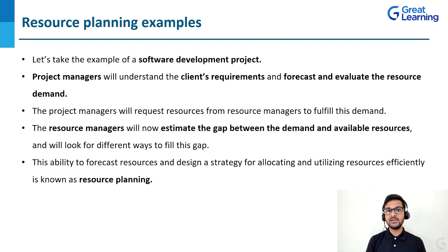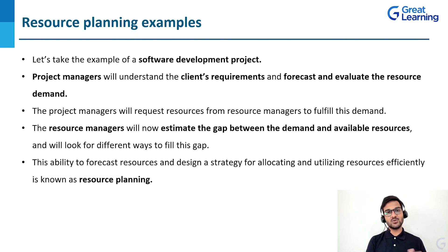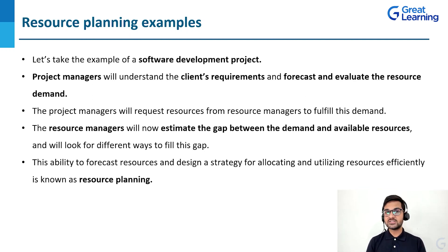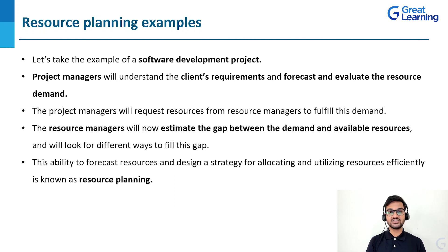The resource managers will estimate the gap between the competencies they actually have and the competencies which are actually required, then find that gap and try to fill it. This ability to forecast resources and design a strategy for allocating and utilizing resources efficiently is known as resource planning. In this entire process, the project managers estimate the resources, escalate to the resource manager who then forecasts resources, finds the gap between available and demanded resources, and finally assigns or allocates the resources. That is resource planning in the IT industry.